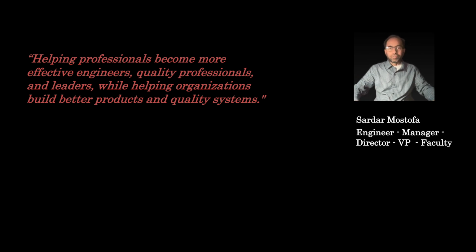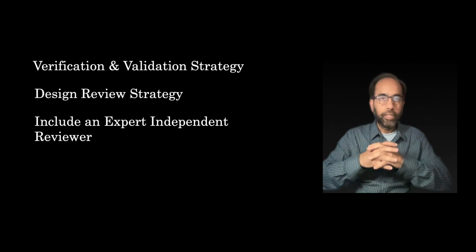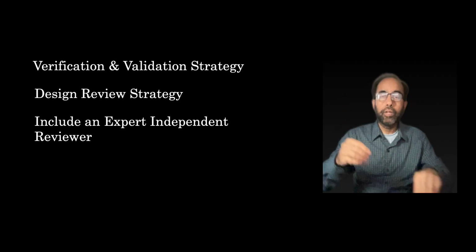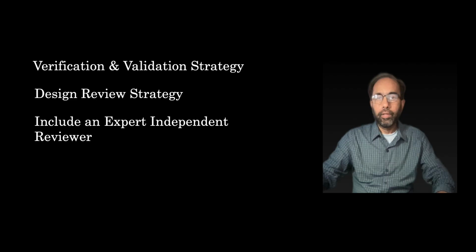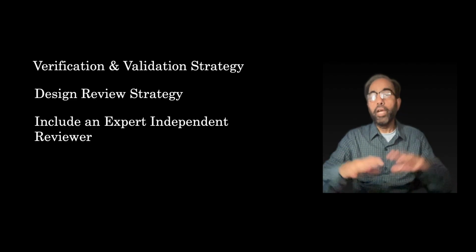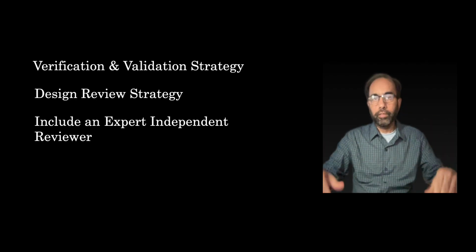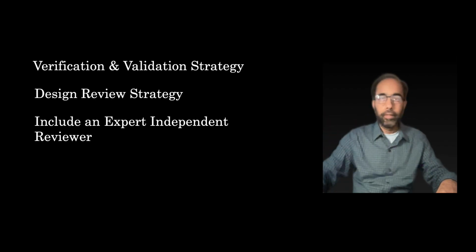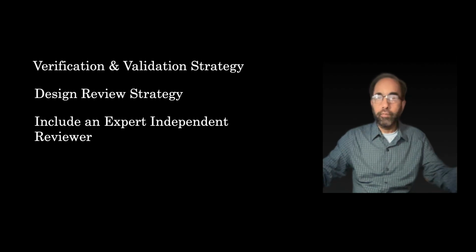Define within your design and development plan a high-level V&V plan, the verification and validation plan. How do you plan on doing certain major activities within your project, such as: do you need sterilization, do you need biocompatibility, and performance, usability, that type of verification and validation activities.